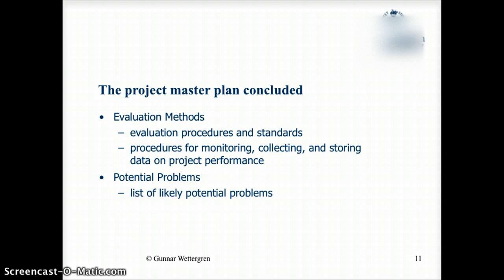In concluding the master plan, we also talk about evaluation methods, how we will do evaluations, how we will monitor and collect data when we actually run the project to see how long various tasks take, how much time we have spent, budgets, and so on, right? The normal way to do this is to use time reporting. All people in the project would report time spent on various activities, maybe at the end of the week, and the project manager can then tally those and get a status of the project that would then be saved and checked against the plan and so on.